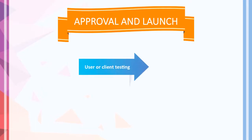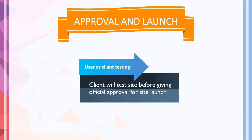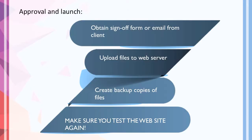For approval and the launch process, the client will test the site before giving official approval. To launch the site, obtain a sign-off form or email from the client, upload the site files to the web server, create backup copies of the files, and test the website again to check for any errors or discrepancies.